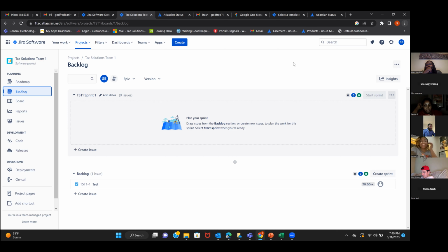So currently, what Godfrey has on right now is going to consist of: you can create sprints, and then you can create all stories, and it's going to show up on the product backlog. But when you get into the sprints, the to-do column is where the sprint backlog will be. So he's going to get into that further. That's what I wanted to add.